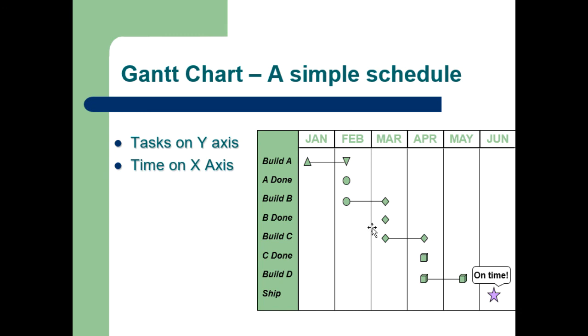So for instance, I'll go to the analogy of building a house. Can I put the windows in while I'm wiring the electrical wiring inside the house? You bet. So what we try to do is, so things happen faster, we'll have these tasks, like task B and task C, might happen in parallel.